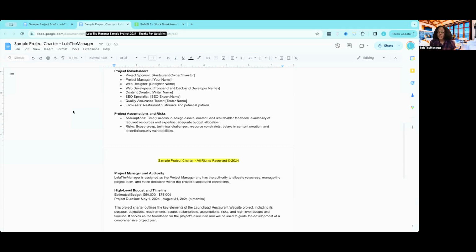Before I go into that project schedule task, I want to reiterate what I said about the work packages. Work packages are the bottom level of the work breakdown structure. The things that need to get done in order for us to see that that package is complete. Packages can be categorized in milestones. It really depends on how you and your company break things down. But if you look at them as milestones, in order for this milestone to be completed, there's a lot of different tasks and activities that need to take place in it. And once that is considered done, we will say that milestone is complete. We'll say the project is complete. Let's get into that work breakdown.